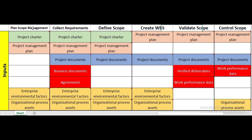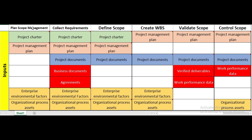The first four processes — plan scope management, collect requirements, define scope, and create WBS — all belong to the planning process group. Validate scope and control scope belong to the monitoring and controlling process group.